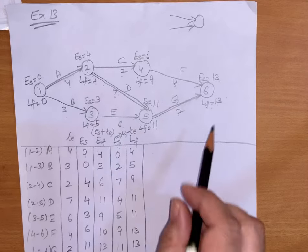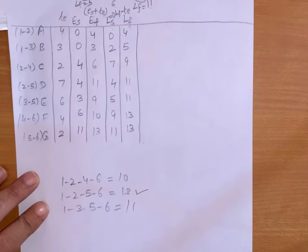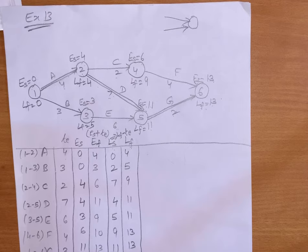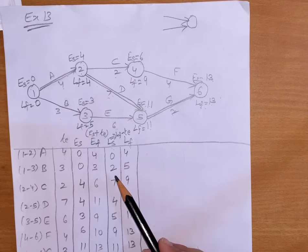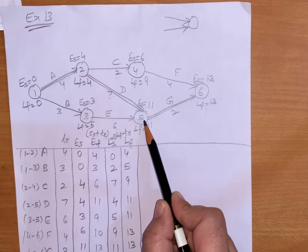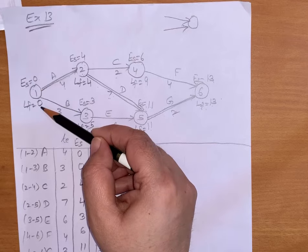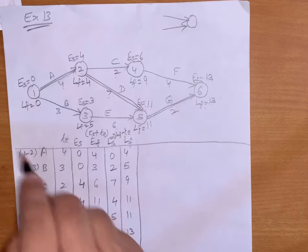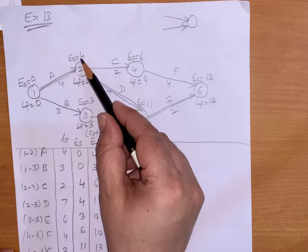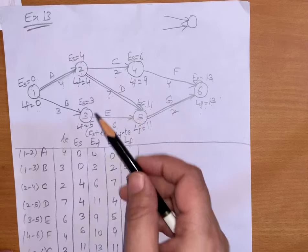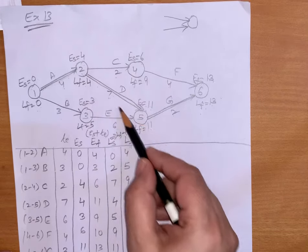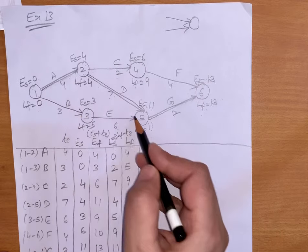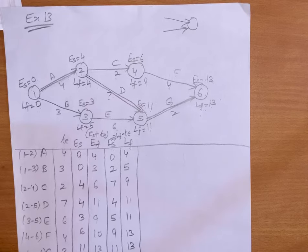Yesterday I told you how to find the critical path by drawing all paths and finding the longest one. Now having calculated earliest start, latest start, and latest finish, just see: for all activities on the critical path — 1, 2, 5, and 6 — earliest start and latest finish are equal to each other: 4 equals 4, 11 equals 11, 13 equals 13. So we can identify the critical path by this method also. These are equal, so they will be on the critical path. For critical activities, earliest start and latest finish are equal to each other.